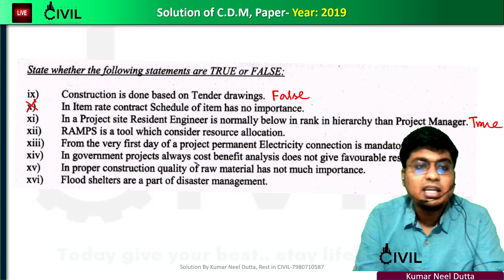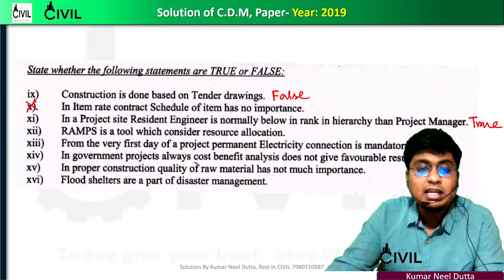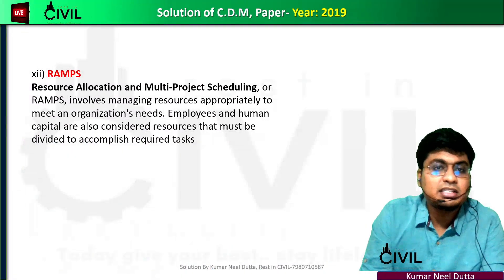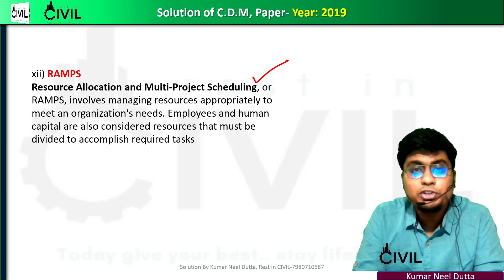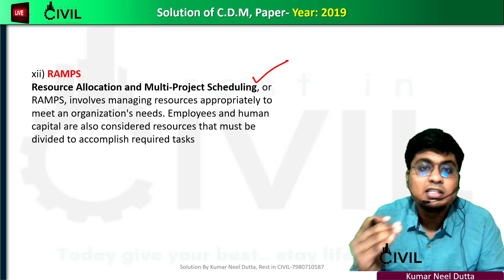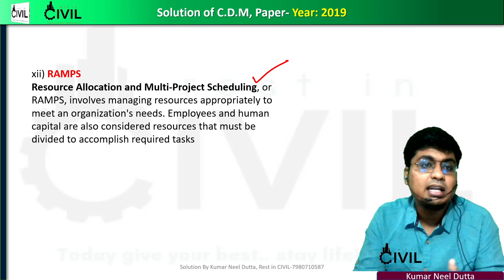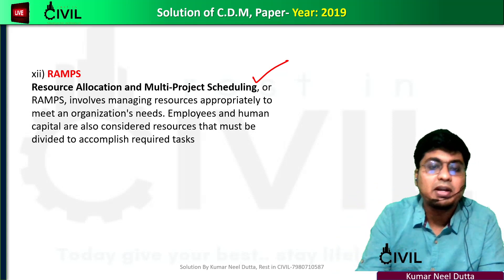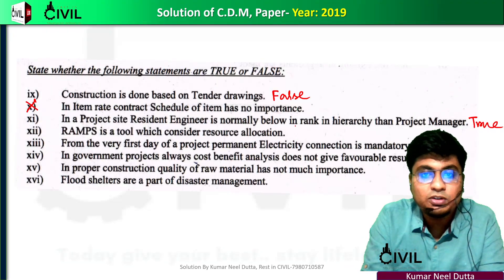Next question involves a tool that considers resource allocation. The answer is RAM — Resource Allocation and Multiple project scheduling. RAM is used to schedule projects considering all types of resources including human resources and material resources. So using RAM for resource allocation is absolutely correct — this statement is true.